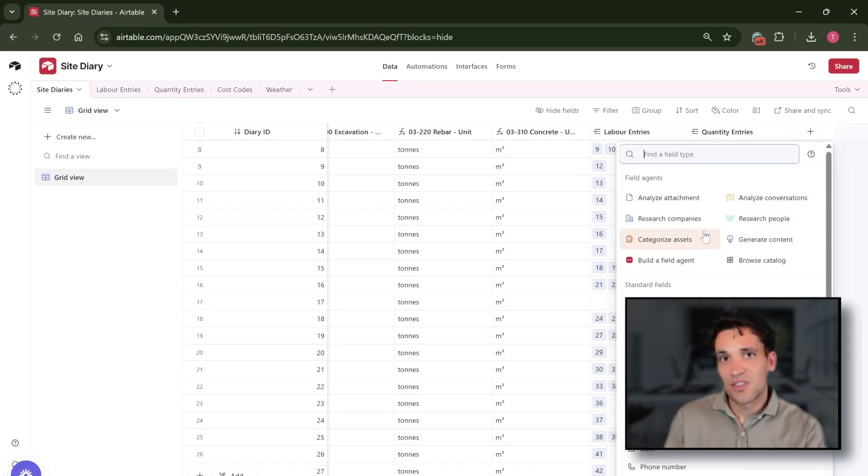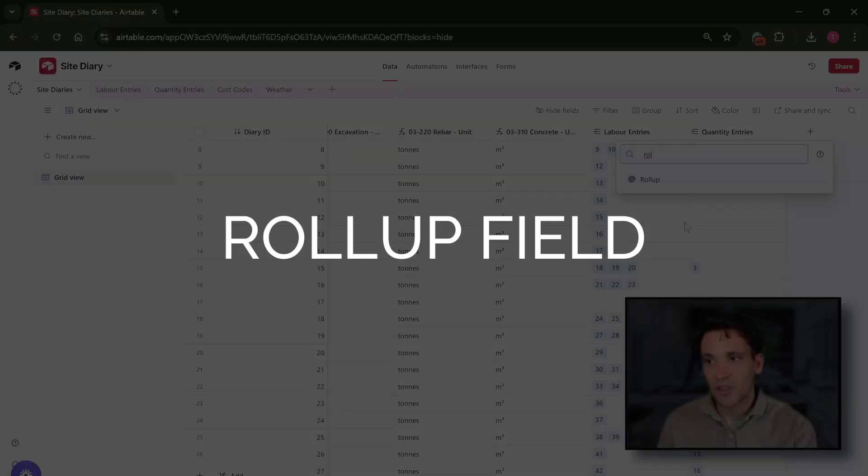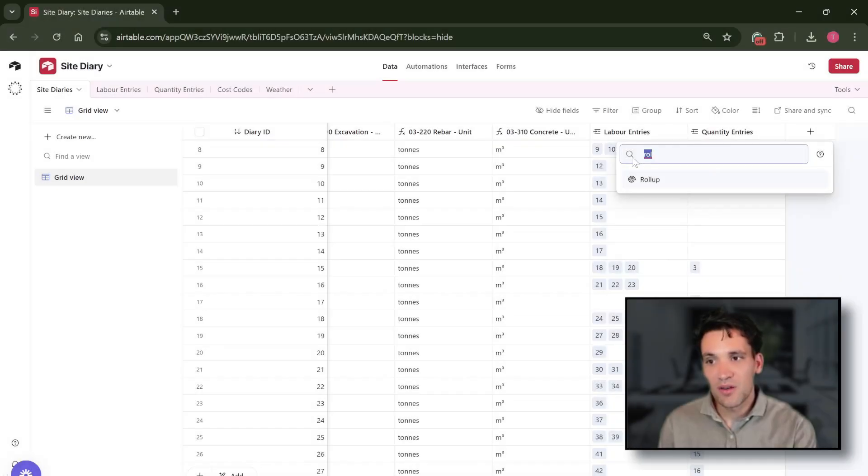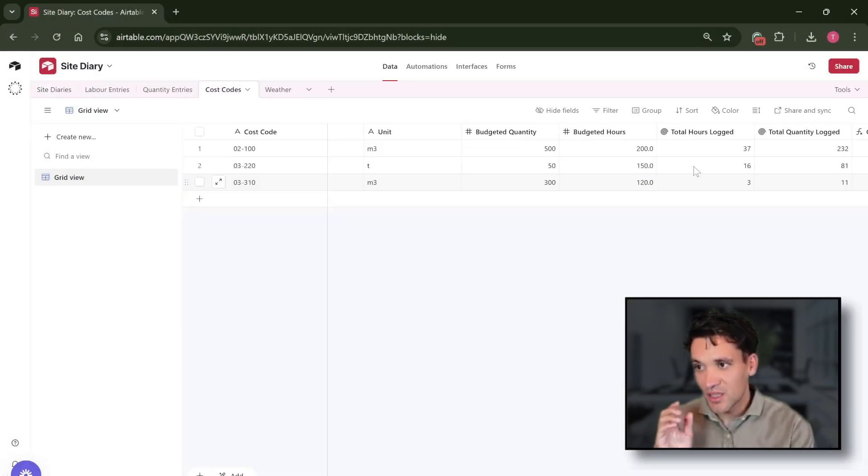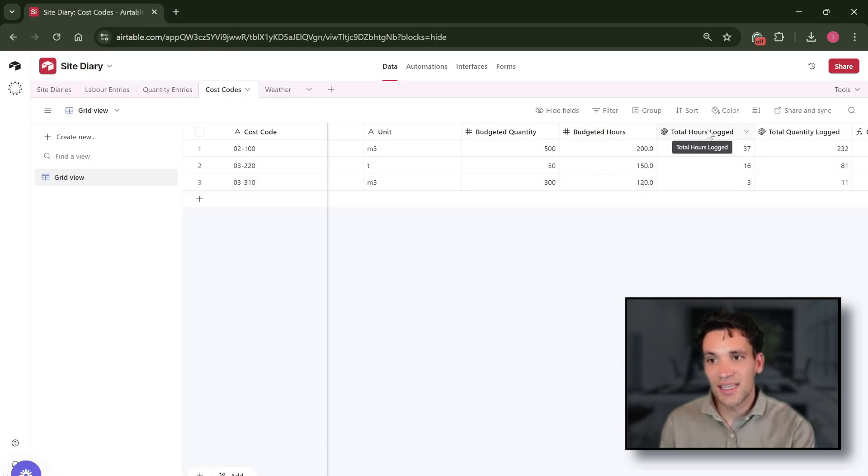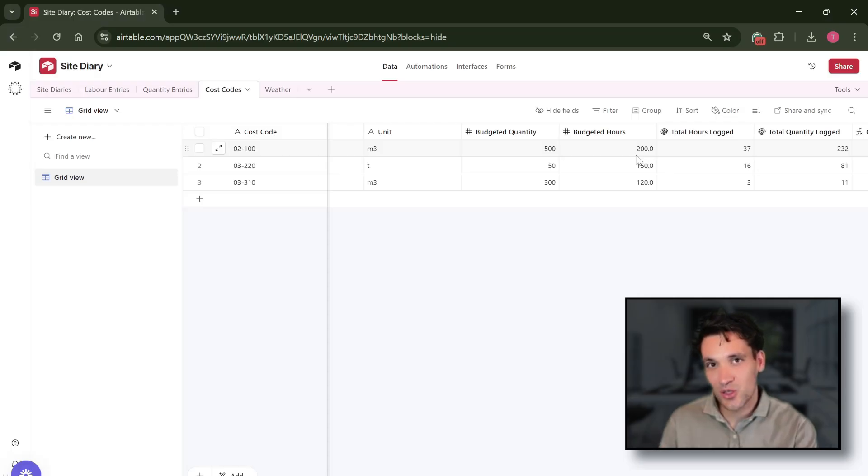In addition to simply just linking records, you can also use the roll-up field which is very powerful for summing data across tables. For example, in the cost code table we're using a roll-up field to sum all the hours worked against a specific cost code.